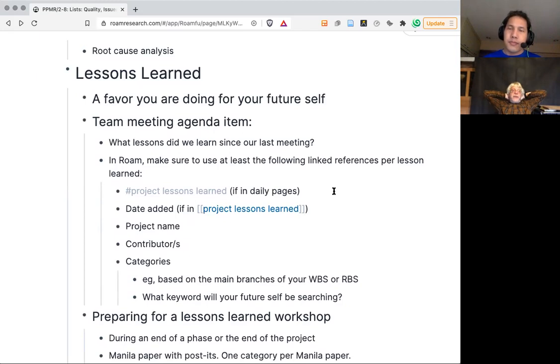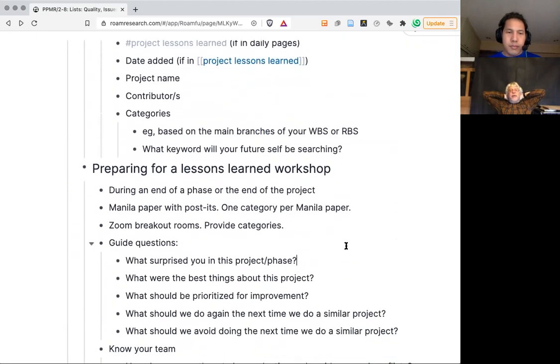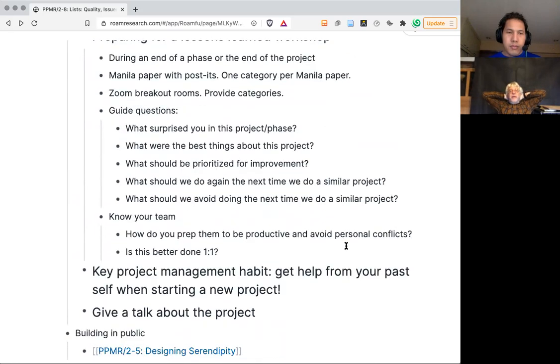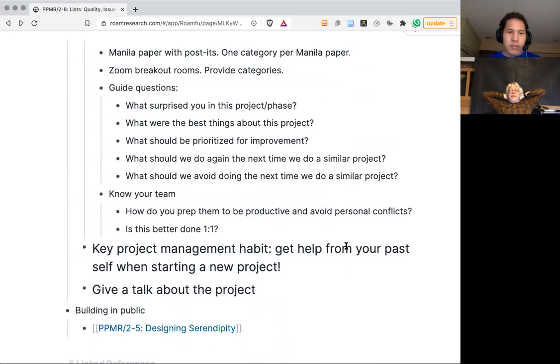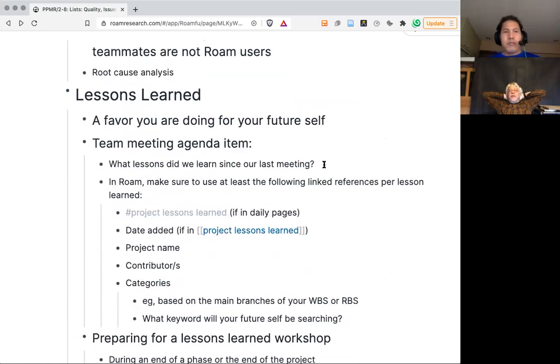The other thing is to capture what didn't work well and to take a little bit of time to understand why it didn't work well. That's the time where you are going to do the root cause analysis of the issue log. You go back in the issue log and look at which ones have been especially painful and what could have been done better to avoid, first, that the issue appear and, second, that the issue costs so much.